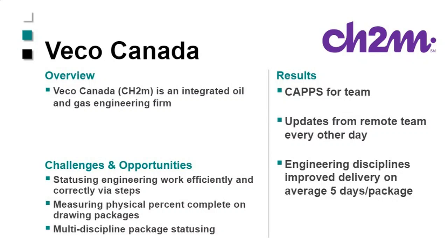They were one of our key clients that wanted steps because what they were finding is the reporting on the engineering progress was very difficult to get consistent. So each engineering group were taking a bit of a wild guess on what percent complete they were because they didn't have a strong methodology at the time on how to understand the physical percent achieved on the engineering packages.